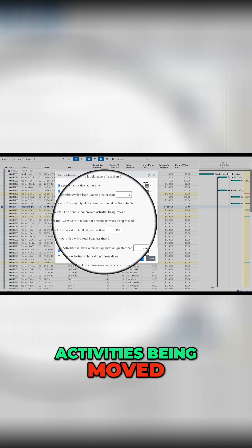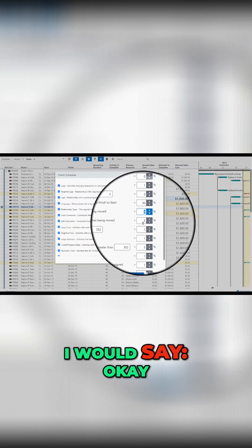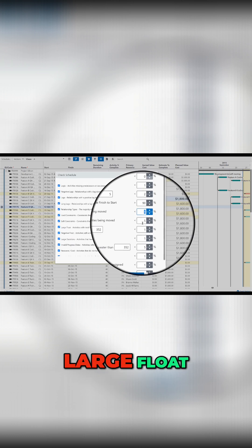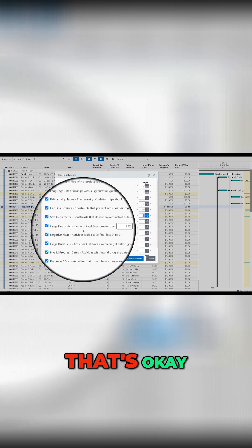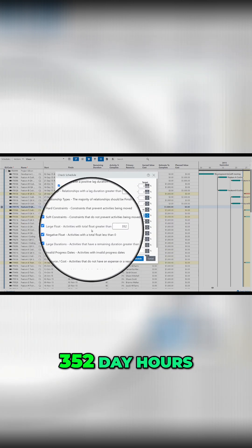Constraints that don't prevent activities being moved, 5% I will say okay. Large float, that's okay.